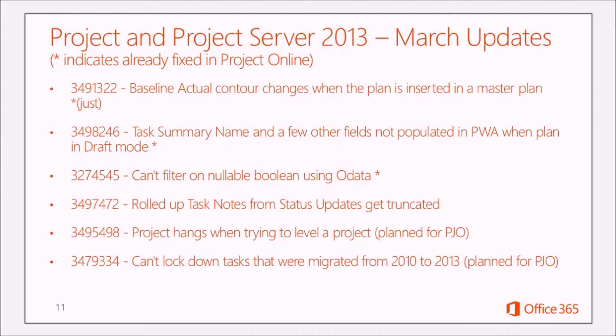What was happening here is that when you had the 2010 project, it didn't have that property in it that said it was locked down. Therefore, you would make the change, it would go in, and the project calculation service would say, okay, I'm going to save all this stuff, but it hadn't actually upgraded the project file itself to include the lockdown field. Therefore, any of those changes you made were lost. So now the project calculation service knows that it needs to upgrade the file as a part of that process to include the lockdown field if it doesn't already exist, so that your changes are saved.